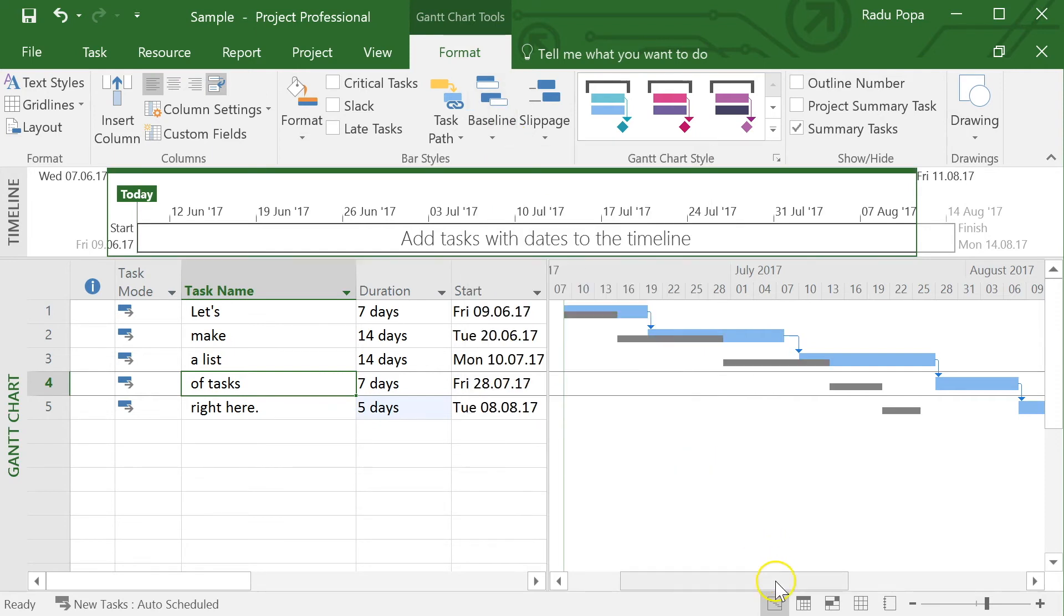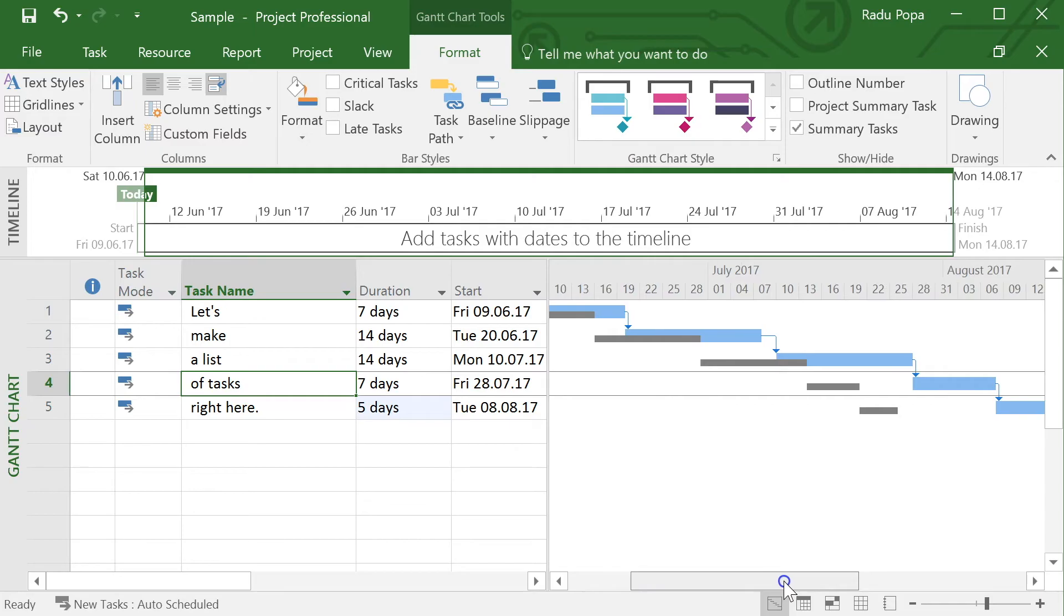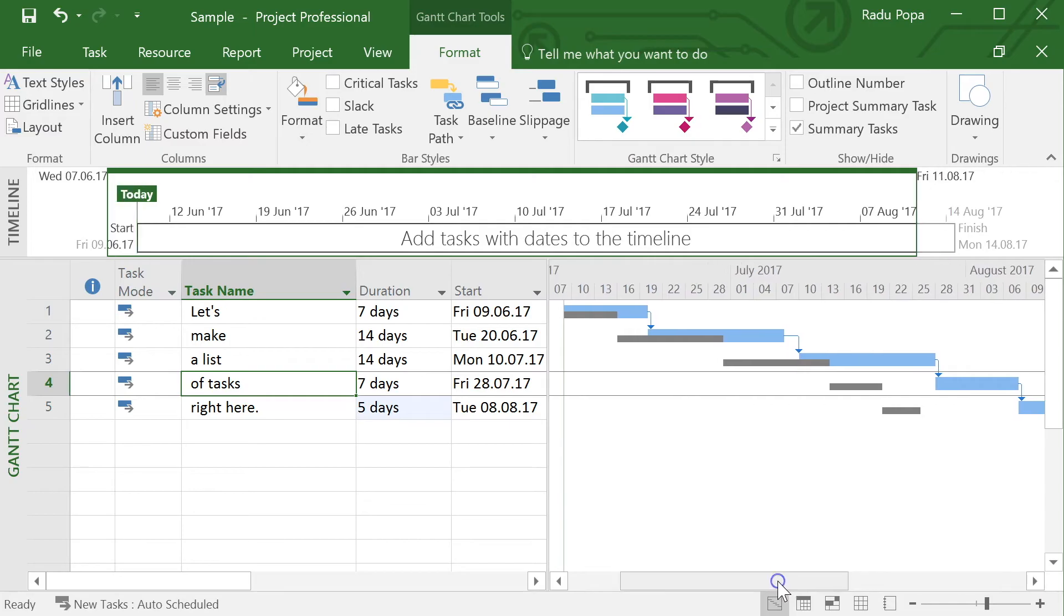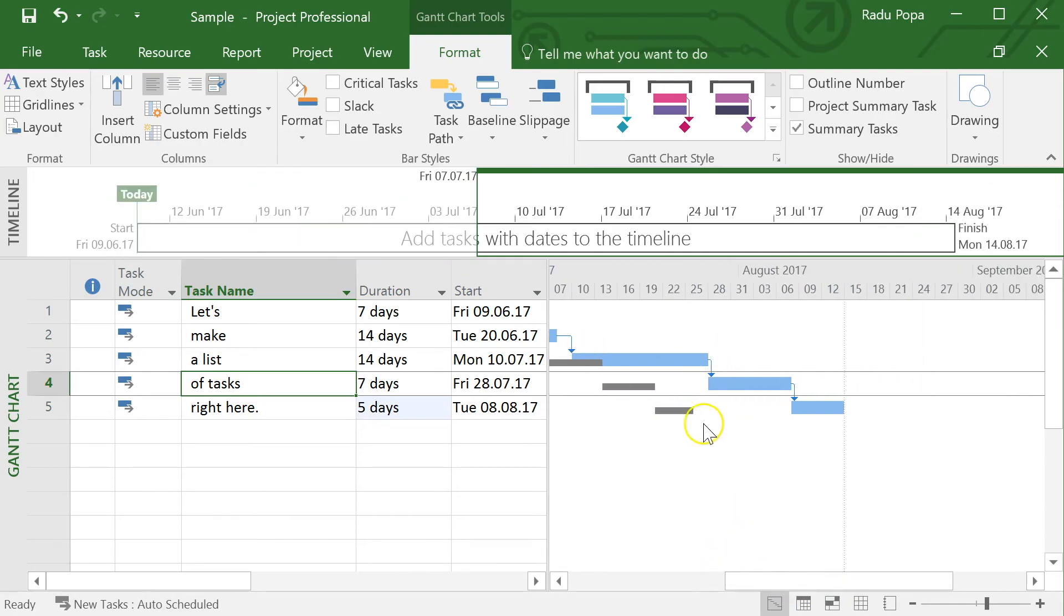And what project does is that it shows me the difference between my baseline and my planning and I can see that I'm way, way off as opposed to my initial planning.